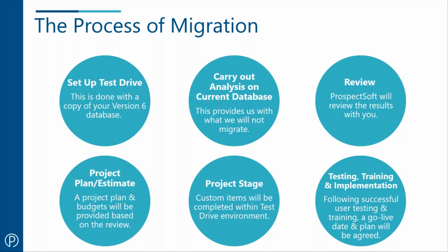Typically for people with smaller databases, we can do that in an evening. So we will kick the migration off at 5 o'clock when all of your users are out of the system, and the next day we will have an up and running 365 system which your users will then log into. For people with a bit larger databases, when we do the test migration, we'll be able to tell you what we think would be the right way forward. Some of our customers do the migration over a weekend period. So the migration will be kicked off on the Friday evening, and then by the Monday, your users will again have the 365 system to log into and move forward with.